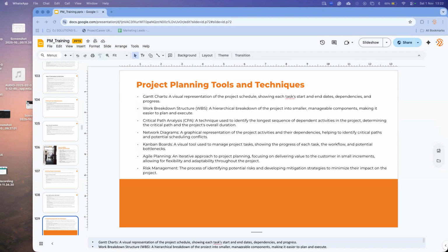So as you can see, one exception would be the first task of the whole project. There's no predecessor, obviously, because it's the first. Filling in anything will give an error. So you always have to start from the second task. Right. So we have that planning phase done.